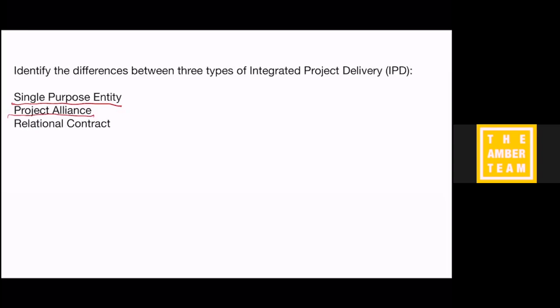But we're in this together in that we're going to tie our incentives to whatever's important for the project. So if the project needs to be energy efficient, then you're going to get $50,000 to become energy efficient. So if the EUI, which means the energy use intensity, as measured in kBTUs per square foot, let's say that that's going to be less than 500.